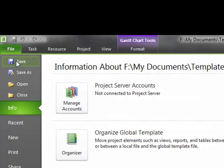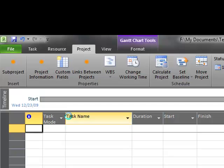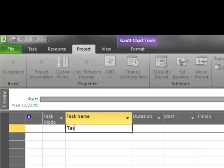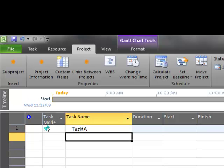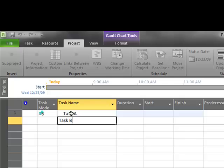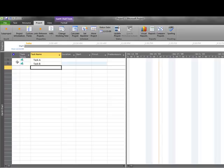One of the other things that you might want to do that's slightly different in this new interface is I might want to show task level zero. You can see here I have task level zero turned on. But if I went ahead and just created a brand new project and just entered some tasks, notice that it's starting at task level one. Now, if you've taken any Microsoft project training in the past, you know that we typically look at using task level zero as our starting point for the project in the work breakdown structure.